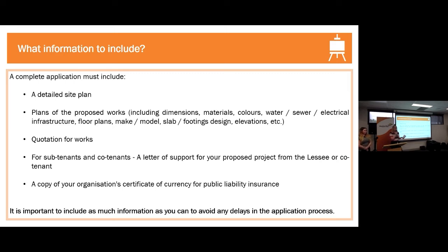So again, going back to the previous slide where we used the shed as the example, that's private building certification, and we want to make sure those costs are included. If there's any structural certifications such as Form 15s or Form 30s that may need to be included, sometimes they aren't put in quotes. So we're just wanting to confirm that you've captured everything that you could.